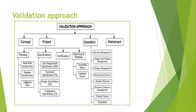Taking a validation approach for any pharmaceutical company, there will be four phases: concept phase, project phase, operational phase, and retirement phase. The concept phase is the initial phase — the business team discusses the cost of the project, the scope, who will implement it, and the timeline. The project phase is one of the most important phases because this is where we implement and validate the new system.